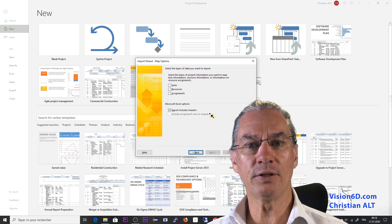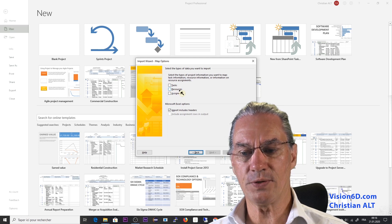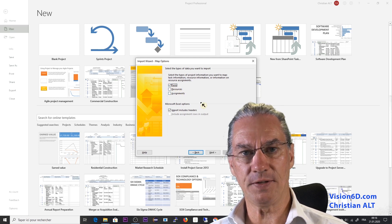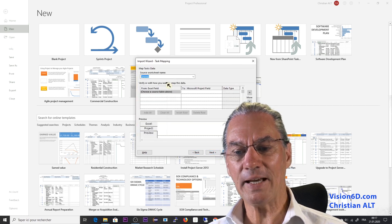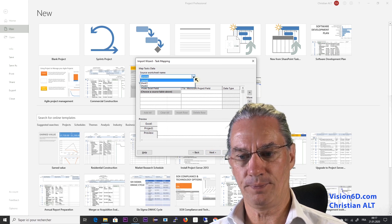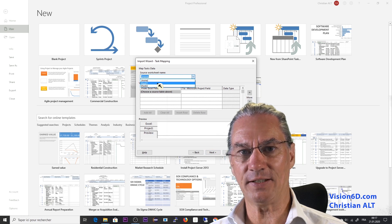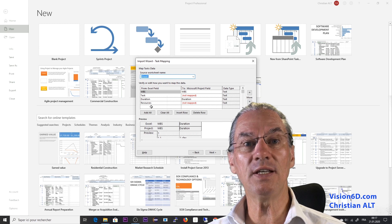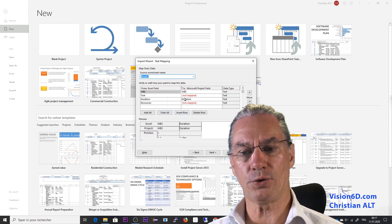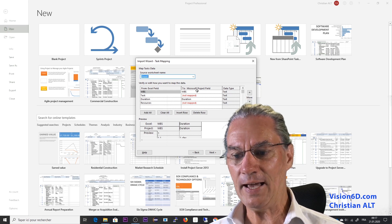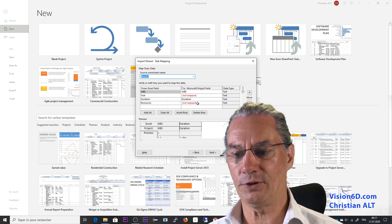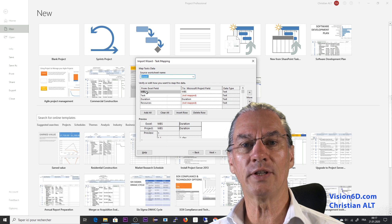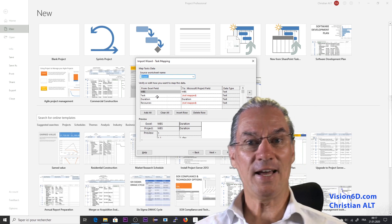And it's going to ask me do you want to import tasks, resources and assignment. I will import tasks and here you see it will ask me what's the worksheet. So I'm going here down and I'm selecting it's on sheet 1 where I have this and as you see here it was able to match certain fields. So here I have the fields of the Excel file and here I have the corresponding fields of the MS project file. So the numbering, the WBS numbering was found.